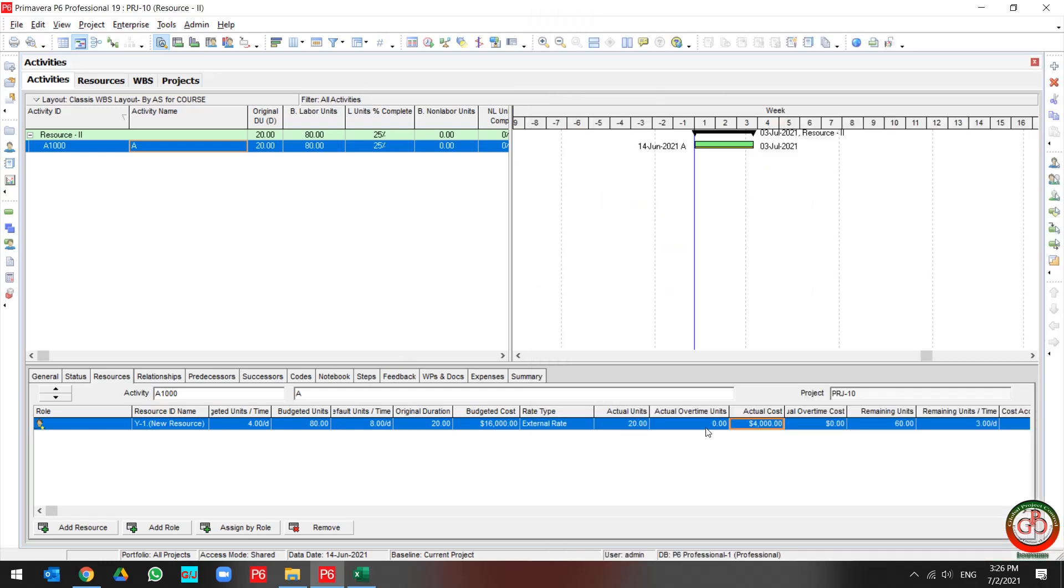I should change the actual unit to 10 and go to the overtime unit and add 10 hours as overtime.